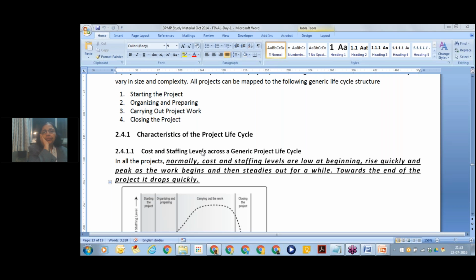Now tell me, will I like to have all the 10 people with me on day 1? Those 6 people who are going to create deliverables don't have any work on day 1. But if they are on my project, I'm getting billed. I need to pay for them. So I don't want those people unless they have work. So what I'm saying is,